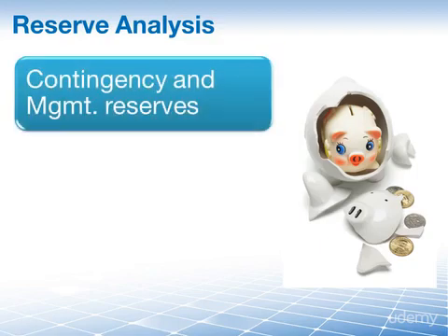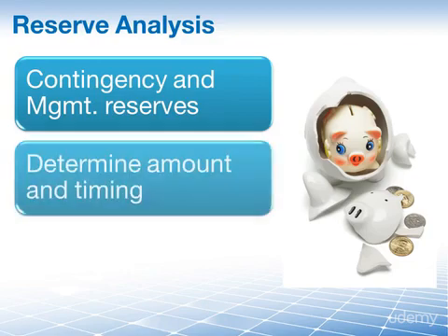You need to consider both contingency and management reserves. When you look at the reserve, you need to determine how much you need and when you may need it. For instance, are there any particularly high risks in your industry that warrant a very high management contingency reserve during the month of June? The project manager then needs to work with management and ensure that this reserve will be available to the project should it be required in June.